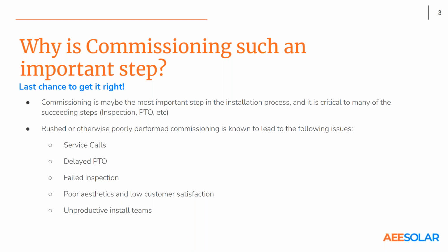If you've got bad commissioning processes and you're waiting on things like firmware or software updates with a 4-man crew and 3 of them are standing around waiting on the electrical guy, that may be great for them, but a lot of you guys get paid on piecework, so that's unproductive. And if they're paid hourly, hey, there's probably other work they could be doing. They could be prepping the next day's job. They could be off the clock. So a lot of bad outcomes flow from poor commissioning.